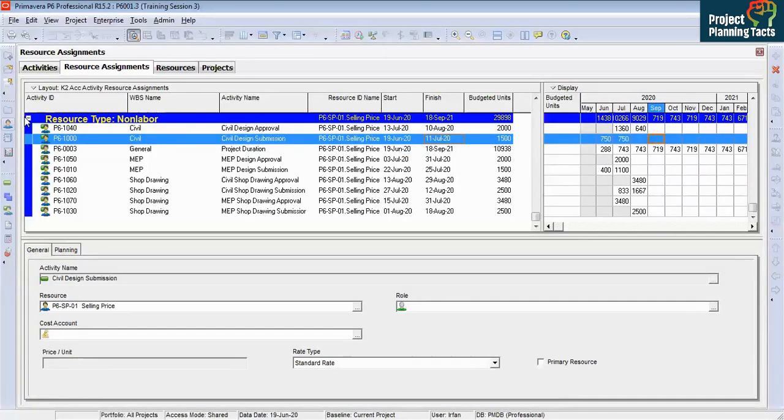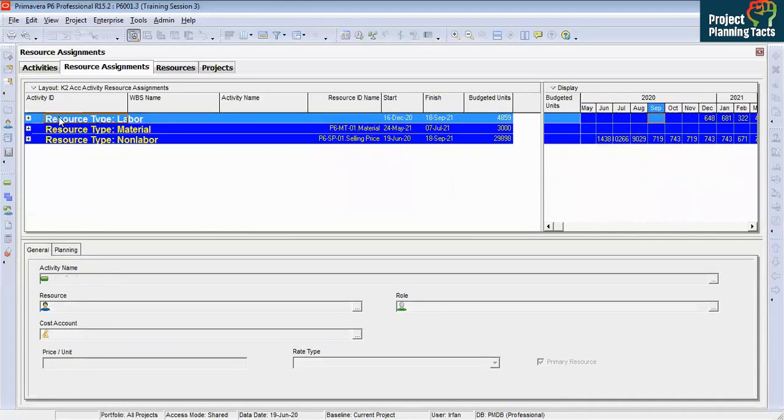So now what you can do is copy all these and paste them into an Excel sheet, and from this Excel sheet it will spread all the units in months or based on your selected time scale, and accordingly you can generate the graph to show on your dashboard, to show as a report.